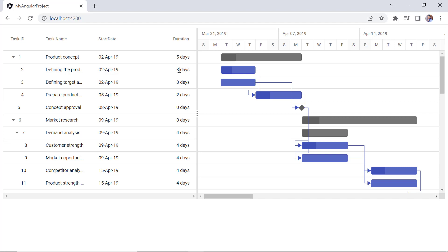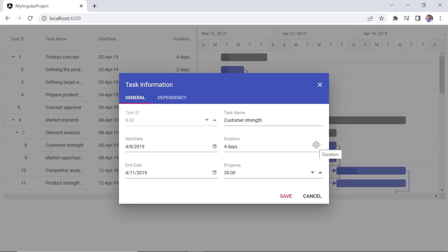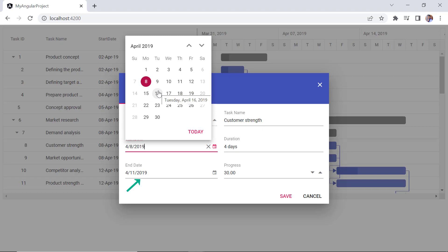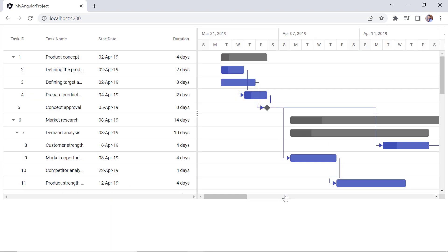On the tree grid side, I can start editing any cell by double clicking on it, and that cell will change to edit mode. I can edit any data, and the changes will be reflected in the chart. On the chart side, I can edit the task using the edit dialog by double clicking on the task bars. In the task information dialog, when I change the start date of the child record, the end date will automatically be adjusted, since the duration is set to 4 days. The end date of its parent task will also be adjusted.